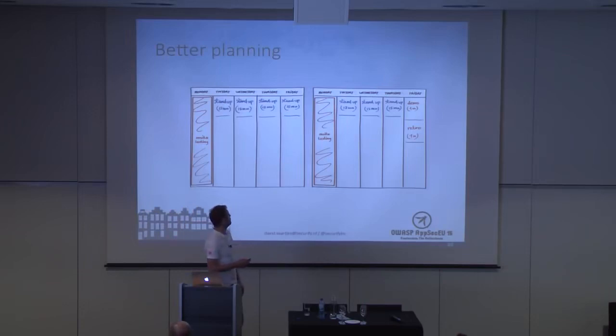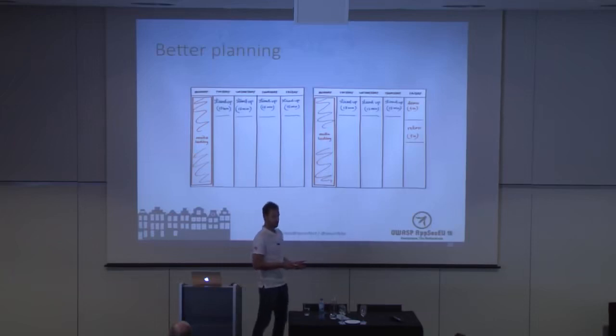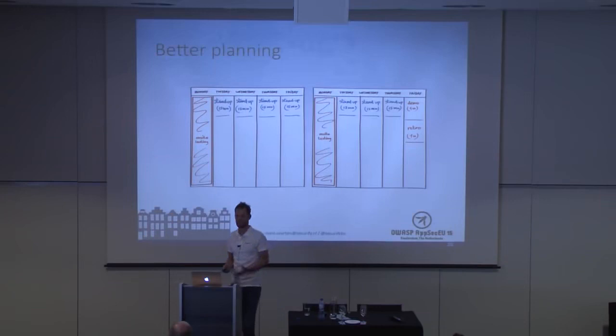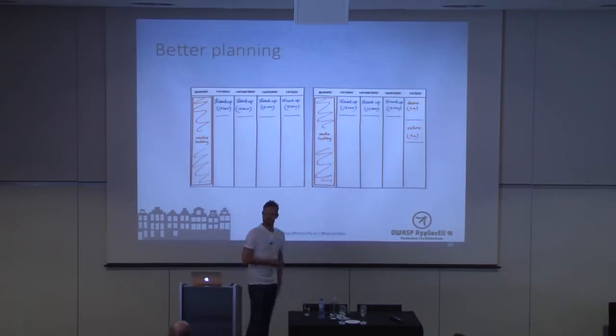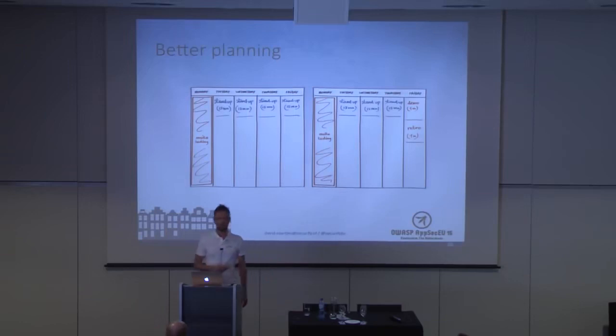So then we spent 8 hours a week on the team, and we were able to do all security testing fully during the sprints in this one day. If you compare this to the security test we did, which took about 5 days, and the sprint is about 2 weeks, we were getting a bit more efficient in time costs as well.